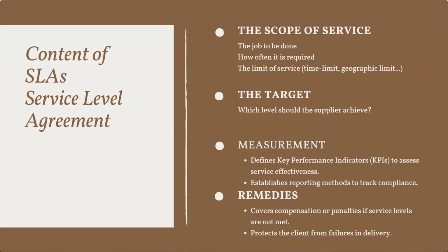However, within a complex contract, KPI and SLA could be separate schedules to the contract. So here we need to distinguish between KPI and SLA, and if we already have the KPI in other part, the SLA here should avoid conflict with those KPI.